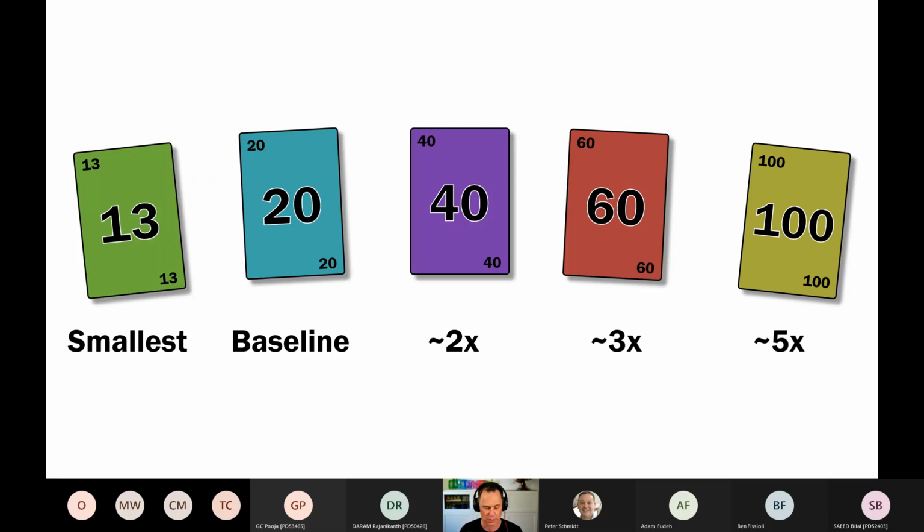It's certainly not the biggest requirement. It's probably towards the smaller end, and we have a good handle on it, and we think we could easily implement that epic in a couple of sprints. Anything smaller than that is going to be a 13. If it's a lot smaller than that, if we think the story is 5 or 6 points, then we'd group some of those requirements together until they're epic-sized. Similarly, if it's more than 100 points, then we're going to split that super epic up. That would be a theme. We're going to split that up until it's somewhere in that 13 to 100 point range.